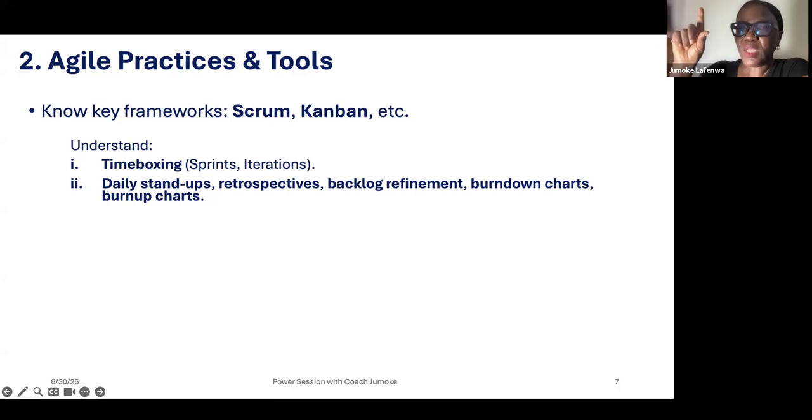So when the team picks the user stories, the features that need to be worked on, they will now determine the work to get whatever they have picked done. Now, the development team will also come up with an iteration or sprint backlog. It means itemized work in order of priority, what will be done after the other. Okay, so you need to understand that. And you also need to understand what we mean by definition of done. Definition of done will be defined at the beginning so that when we achieve this, it means we are done with this iteration. Then you have burn down charts as well as burn up charts.